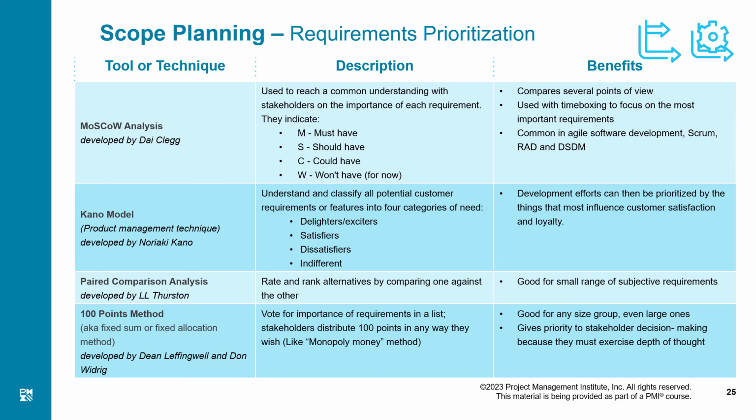And in light of that, we could rewrite or amend the contract. We could ask them, okay, let us exclude certain requirements from the contract, as we are not bound in a predictive project. So won't have may be excluded, and even for could have, the customer is of the mindset that though they need those requirements, they may or may not be fulfilled. With that understanding, we could amend the contract and go on with the predictive project with confidence.